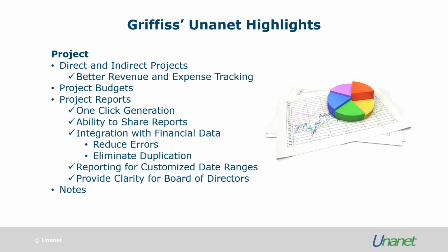And you can get reporting for customized date ranges. So this is important because our fiscal year for the Griffiss Institute runs on a calendar year. Our government projects run on the government fiscal year. Our state projects run from the time that they were initiated for 12 months or 24 months or whatever the period of performance is.